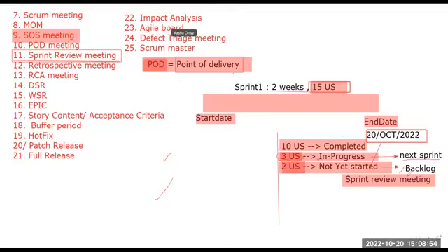Yes. Okay. Got it. So the story that is not started, we can complete that in the next sprint or later. It depends. Let's say the client is saying that we have not started, but we want to finish it in the next sprint. Then that also we can move to the next sprint. But ideally we need to move it to the backlog. Okay, sir.